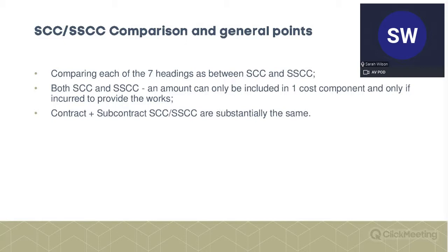But I think the other thing to point out to the PM, and it's the middle bullet point that I'm talking about, is that this note that you can only claim it under one does suggest that there is a bit of ambiguity and the items are claimable under more than one category. And I think the pragmatic approach is, if it is a genuine entitlement under one, then it should just be paid. And I think this supports it.